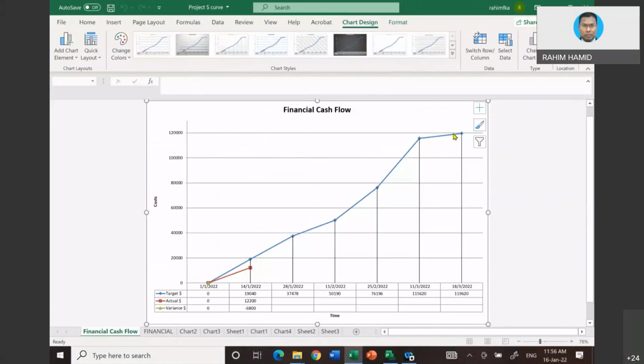Right now, in terms of financially, let's say we want to get the value in terms of 2 weekly interval or whatever the interval that you want. You can do weekly, bi-weekly, monthly, whatever. Normally, for a big project, let's say you target a progress claim or report every month. So your target date would be every month.